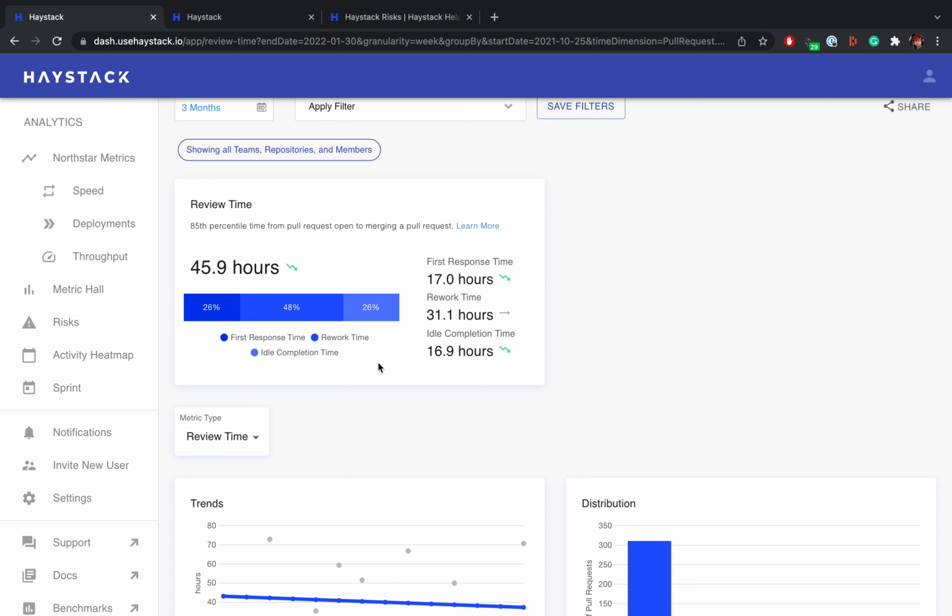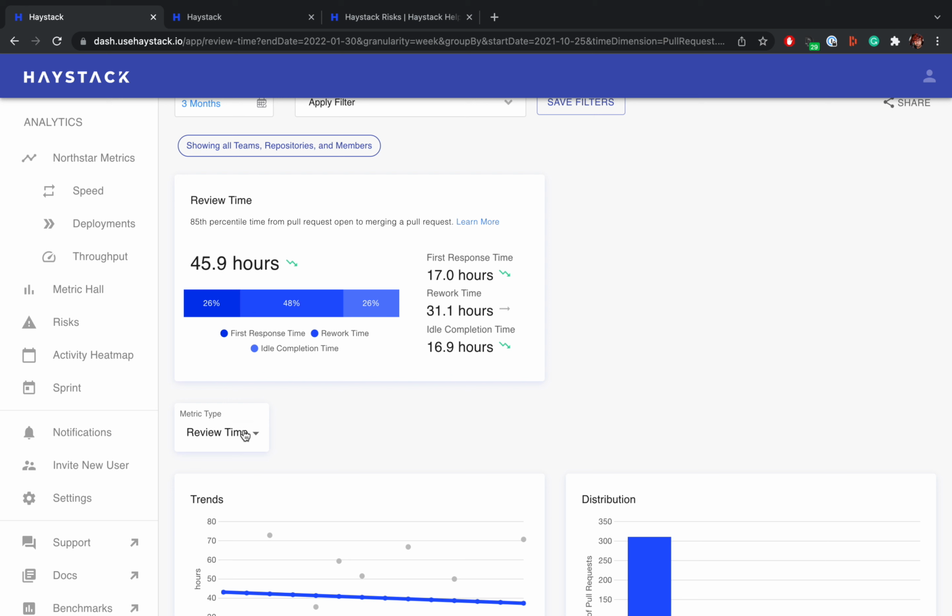Usually in those instances, it can be because the developers aren't incentivized to complete what they're doing before moving on to the next thing. It's always best to complete something, then move on to the next thing. It means that your developers are going to be more focused on one thing. When they're focused on one thing, that thing is usually going to be done better, more reliably, and it will be done quicker because there's none of that cognitive overhead of task switching. And of course, we can then look at these metrics, drill in and understand where the risks are, potentially things which contribute to these.